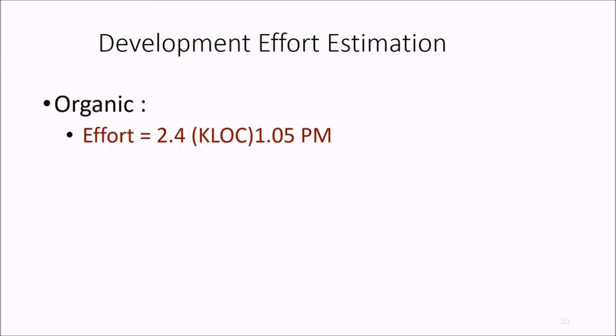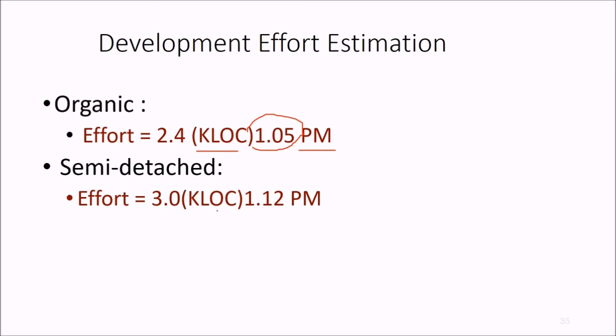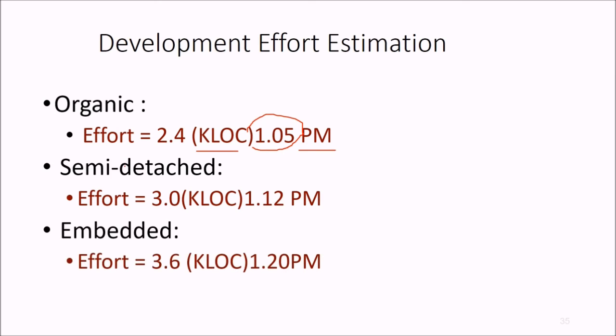Then we come to development effort estimation. First is organic: 2.4 into KLOC, and 1.05 is the power, person months. Semi-detached is 3.0 KLOC to the power of 1.12 person months. Embedded is 3.6 KLOC to the power of 1.2 person months.